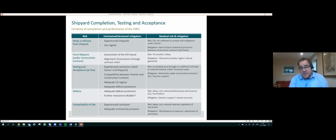However, in these circumstances, termination is likely to be the last resort for the project, because, of course, without the FSRU, there will be no project, at least in the short term, until a replacement unit can be found. Therefore, depending on the severity of the defect, the project may want to maintain the Charter and the FSRU, even with the defect, and may either accept the unit against payment of the liquidated damages and an adjustment of the warranty, or a pro rata reduction in the hire rate to compensate the project for its deficient performance. Neither of which, of course, is ideal for the FSRU sponsor or its lenders.